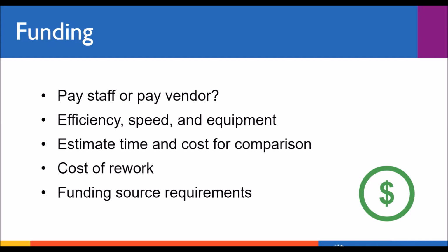If you wanted to compare, you could always do an in-house pilot and do a cost analysis for how much the full project would take with your level of staff. If you don't have the ability to do that sort of test sample batch, you can always use the DLF Digitization Cost Calculator, which is a tool that will help you estimate the amount of time and money it will take to do the work, from preparing material to scanning to performing quality control and generating metadata.